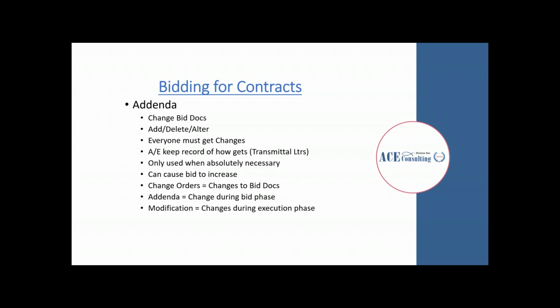Addenda are usually used only when absolutely necessary. And because of changes to the project, it's realistic that addenda can cause the bid to increase, become more costly. Addenda can lead to change orders, which would also change the bid docs.